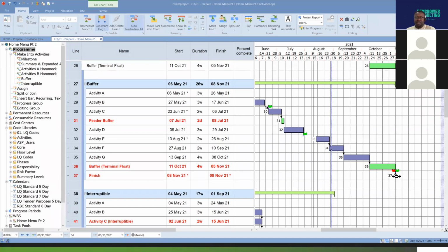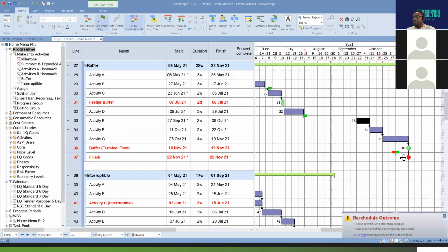So the project team must do everything in their power, put as many resources as possible into it and plan that project properly, so that date is not crossed. However, it is possible that the date goes beyond. Now, let's assume for any reason that activity is delayed there. You can see in this instance, your buffer is completely consumed and that date has now gone out. So when you have a project buffer, your finish date only goes out after that buffer is completely consumed.